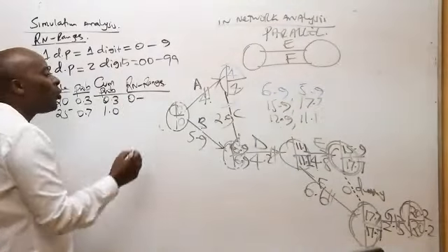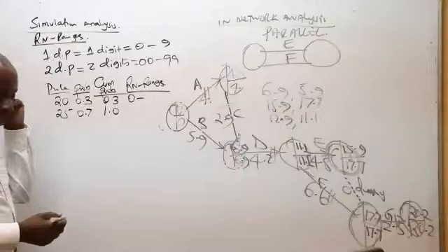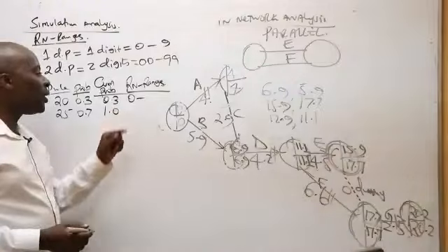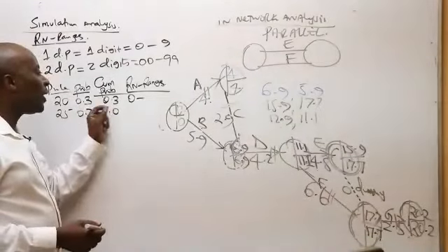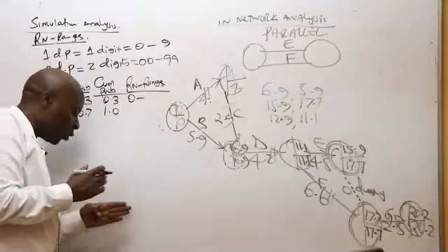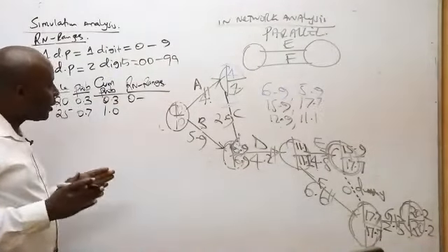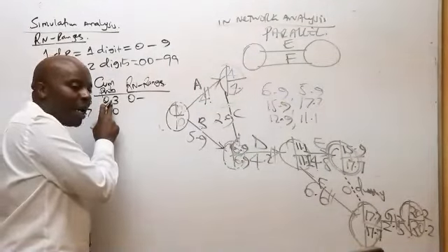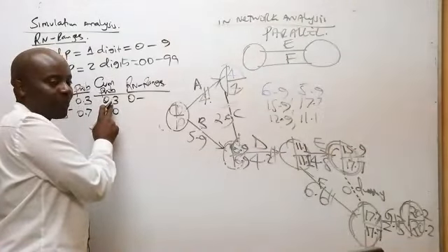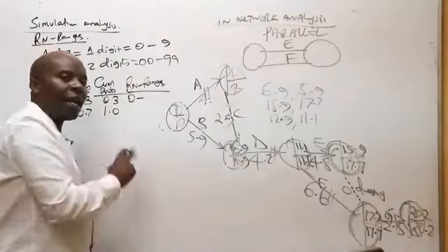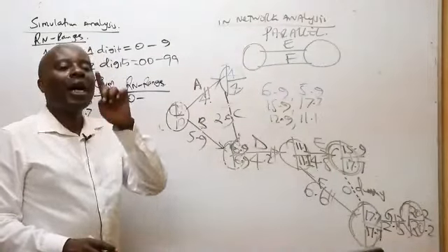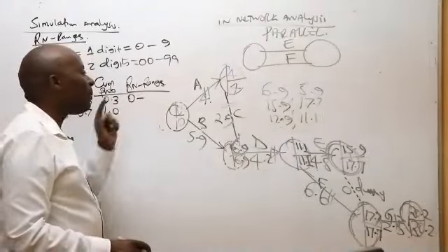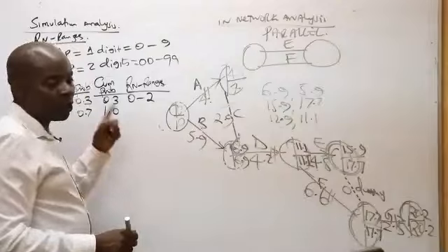So the first range, how do we get the first range? At first, this may look a little bit complicated, but it's a very simple thing. Listen here. To get the upper limit for my range, because a range must have lower and upper, I will read this number as if it's a whole number. So we're reading this as if it's 3. We read it as a whole number, and then we deduct 1. So 3 deduct 1 to get the upper limit. The upper limit here will be what? Somebody, it will be 2.